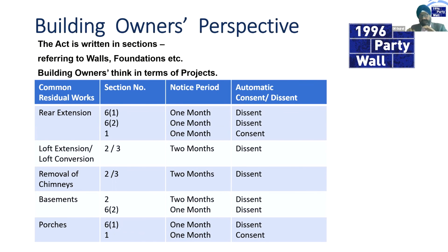But it depends. They could have a modern outbuilding that's been constructed recently, and you're going to go to the same depths. Under Section 6, and I'm going to cover this when I cover Section 6, you have two joint tests. One is you're excavating within 3 meters of their foundation, and it's their foundation and not the boundary. You need to be clear on that. And also you're going to go to a lower depth than their foundation.